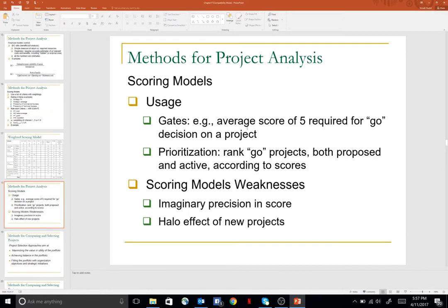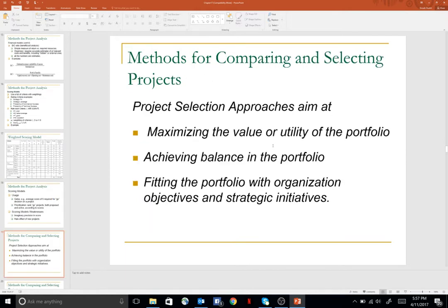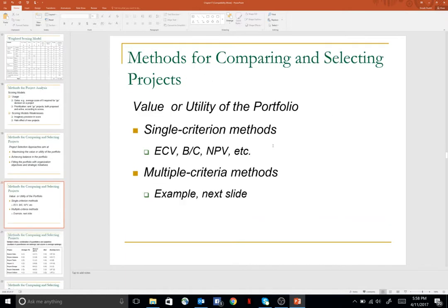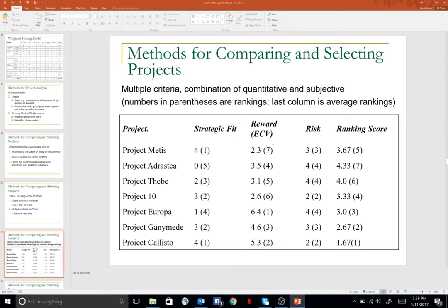And once again, this also ties into the gating aspect of project portfolio management, whether or not we want to continue. What we can actually do is set criteria, right? So if I want a minimum score, like let's look at all these different projects here. Let's just say, as a general rule of thumb, that any project below 3, I'm going to terminate.